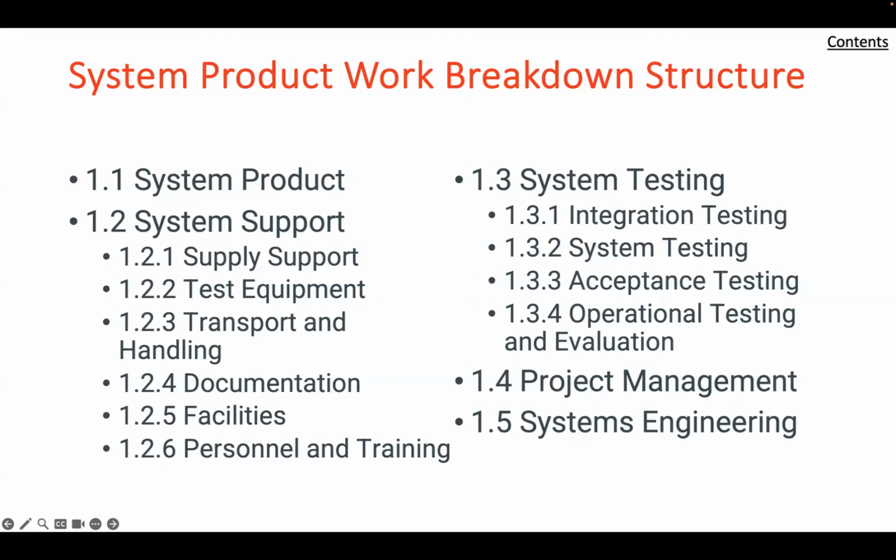Individual tests to be performed at each level are prescribed in a series of separate test plans and procedures. However, an overall description of test objectives and content and a listing of the individual tests to be performed should be set forth in the integrated test planning and management document, the test and evaluation management plan, or TEMP, in defense acquisition terminology. Other chapters are devoted to the subject of system integration and evaluation, so we'll be getting to that later.